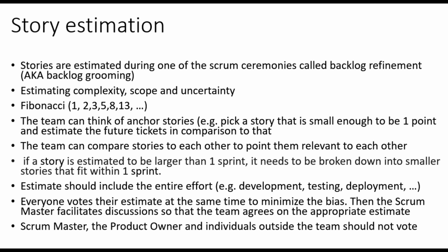And one last note, only team members who directly work on the stories vote their estimate. Therefore, the Scrum Master and Product Owner don't vote, unless they will be directly working on the stories.